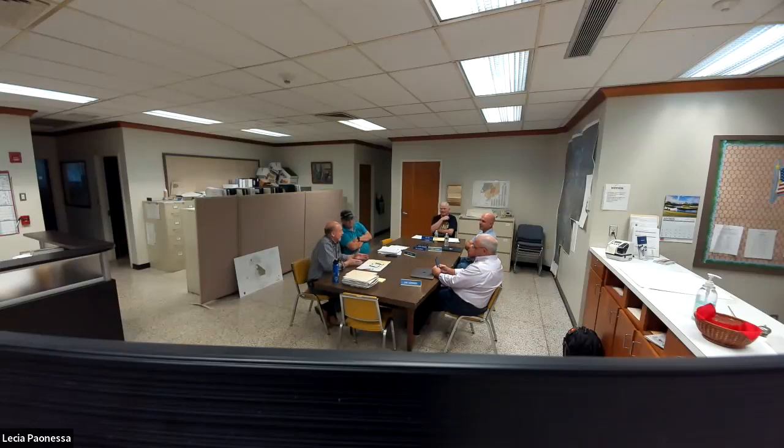Yeah. It needs to be repaired right there, and I don't think incrementally it's going to be a big number. We have unit costs from our on-call contractor, so I'm going to send them to Patrick and Brian and say, this is what we're paying now for just these, which William Layden does on call. So we have per square foot, linear foot, and they can convert that into a cost for comparison. If ASC is really high, we could just say, this is what we're paying now.